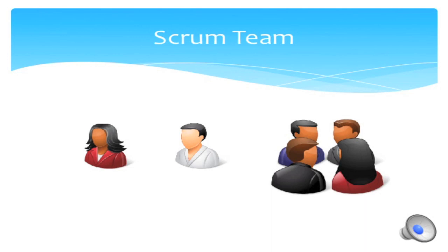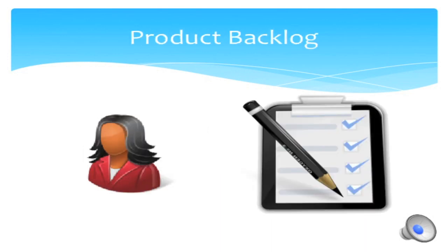The first thing that happens is that the product owner leads the creation of something called a product backlog. In simple terms, this is a list of work that will be done for the project. Nothing detailed at this stage, just an outline. In my experience, the initial creation of a product backlog for a complex product can take less than a day, and if the Scrum team is experienced, you'll be able to draw up a roadmap of feature delivery from this one-day meeting.